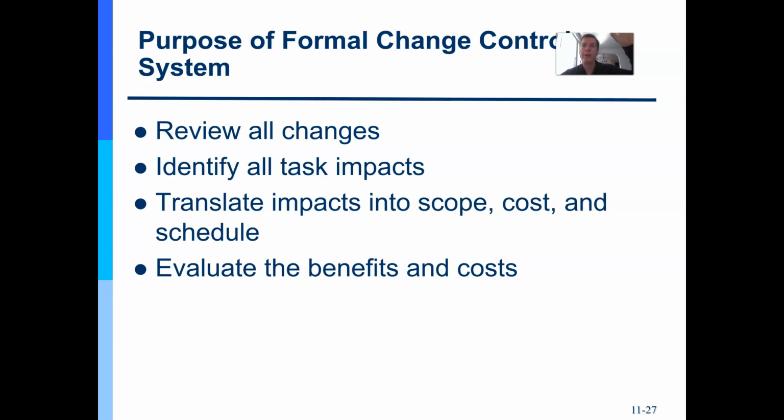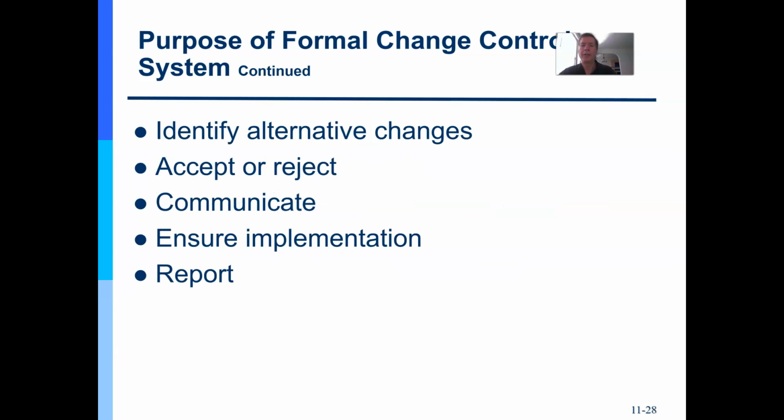So we take the data, which is raw, we analyze it to create information, and we summarize it in a report. And that report recommending for or against the change should come out to the board. And the board is going to evaluate the costs and benefits. The good news here is in the terms of control, the project manager isn't solely responsible. You're responsible for identifying the issue, creating the report, but in the end, it's going to be a collective decision by a board, which is good, I think good.